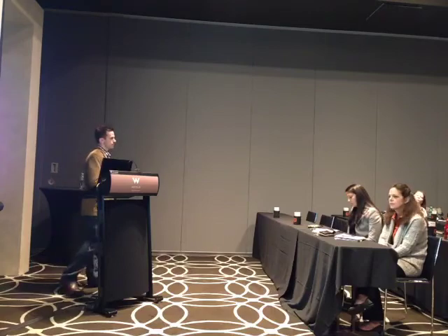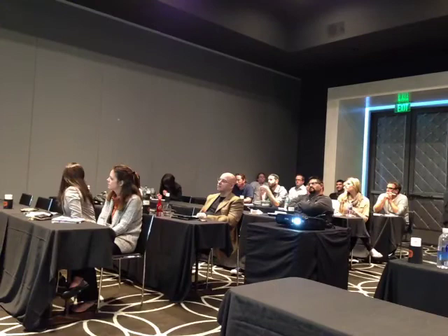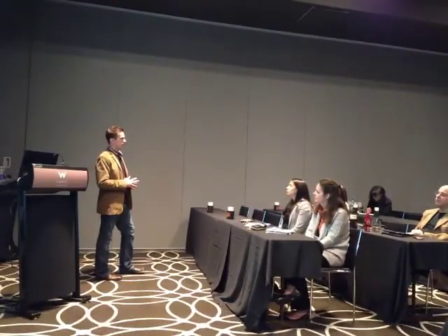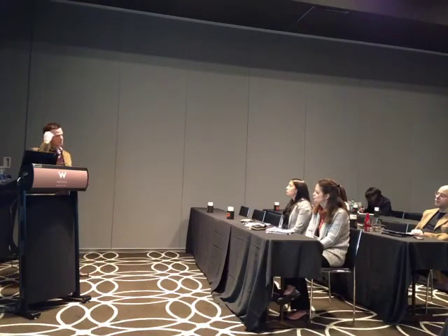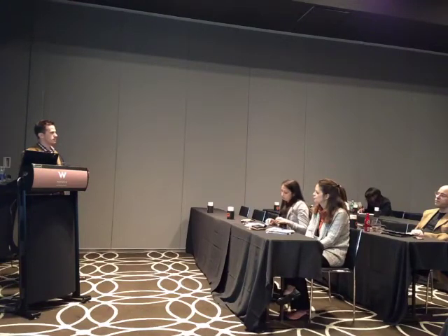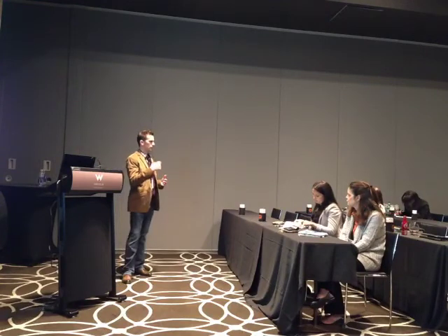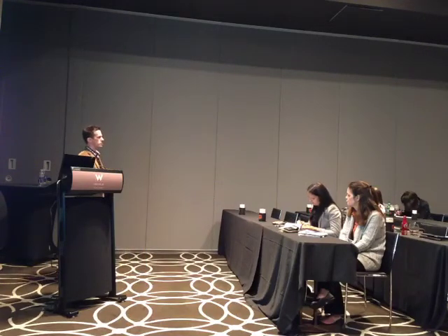Question on that. How do you keep things synced up as far as folder structure, or just within the context of the project, those files? That's definitely a manual effort that falls on the project managers. What we try to do is keep the final deliverable files out of Central Desktop until they're final or we're sharing with the client. So you will have to update it through the revision cycle. If you're going through client revision 1 or 2, that final deliverable could get updated, but that's part of the account and project management workflow within Central Desktop, of how they use the tool.